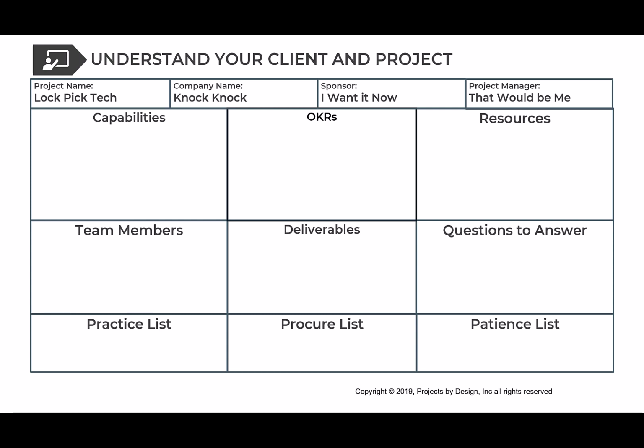Well, when we implemented Clarity at Expedia, they created resource management roles, and that's what they did. They just managed resources, right? We went through and we did skill set inventories. What skill sets do they have? With us as a city, that's a little more difficult to do because then you start talking about bargaining units and unions and different weird things that get involved that aren't in the private sector. You don't care. You just tell me what skills you have. I'm going to plug into the application, and that application is going to tell me, based on the projects that are coming up, when we're going to need you, right? And then we can work out the conflicts from there.